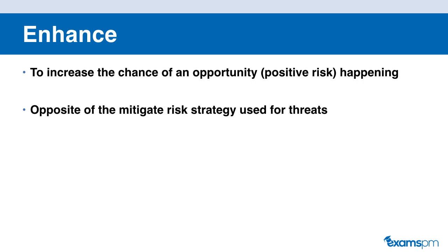So this is an opportunity for you. Therefore, you compress the schedule of the current project so that you can finish ahead of time and have a chance to bid on the new project. Here, you're using the enhance risk strategy. You want to enhance and increase the probability of realizing this new opportunity.